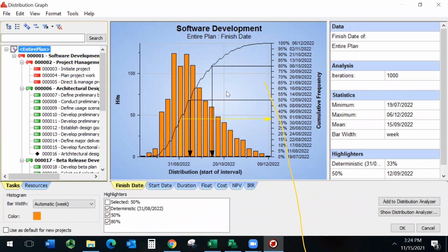Now, when you model existence task risk in your project, you can actually choose what happens in that dialog box, whether to keep links to other task options or whether to remove the links. It depends on the scenario. If the task does not exist, you can say, leave the link anyway, it will not impact my project. But you can say, let's just remove the links. It doesn't make much of a difference for you. So you can certainly do that.